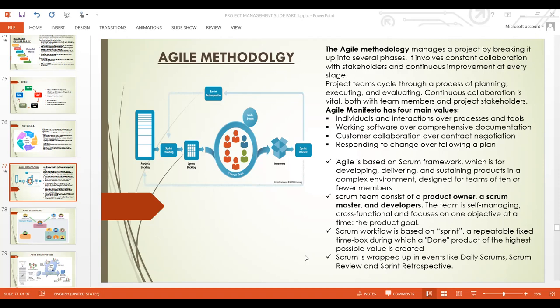Scrum is designed that way because more than 10 is a noisy team. And when the team becomes noisy, it becomes distracting. A lot of distraction will be coming in and they'll become less productive. So Scrum designed its team to be very, very small and very, very powerful. If the team becomes more than 10, it's no longer Scrum. That's how Scrum is defined, looking at the Scrum guide.